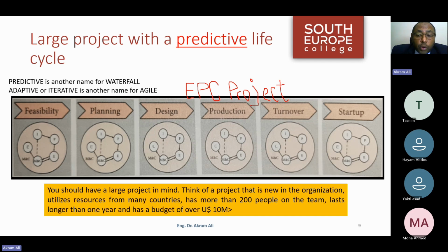The output or product of such a phase of a project is the feasibility study itself. So the feasibility study will give us projections and recommendations, and based on the result of the feasibility study, I have the opportunity to either approve the planning phase of the project or cancel the project.